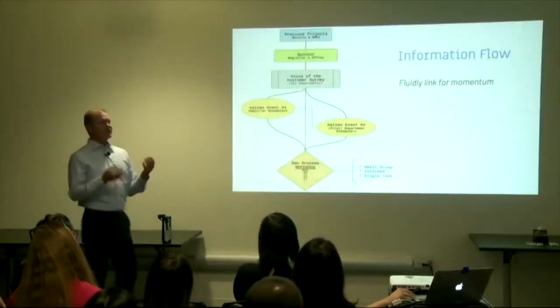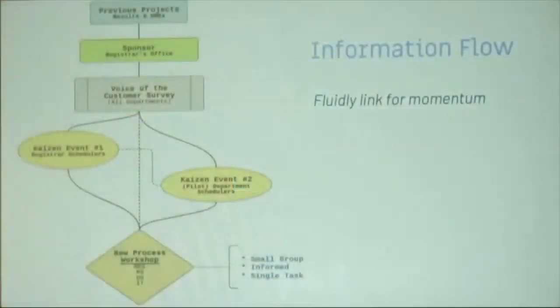So the other part of all this is the flow and the information flow. So this is one example within my project of how information flowed. We did a voice of the customer survey with all the academic departments, the schedulers in those departments. When we got the materials back, we had a Kaizen event with registrar schedulers, combed through all the results.